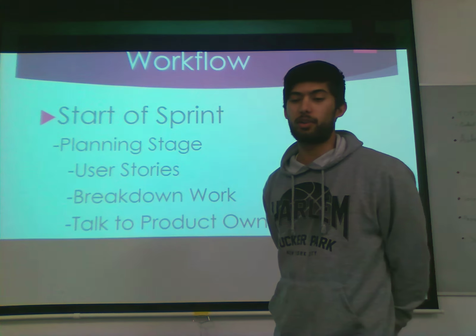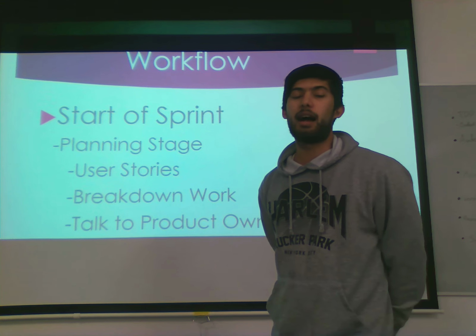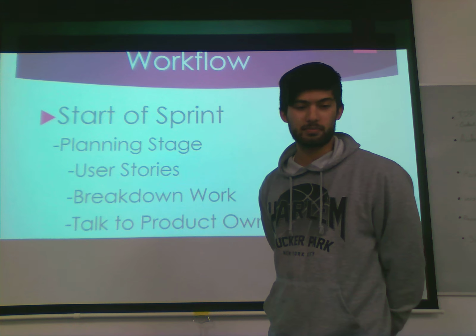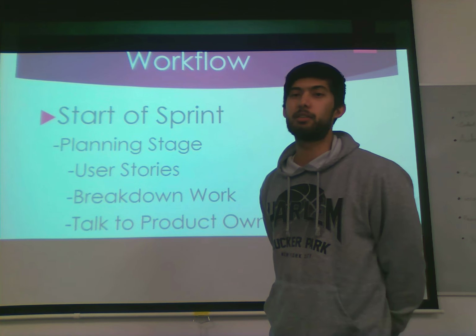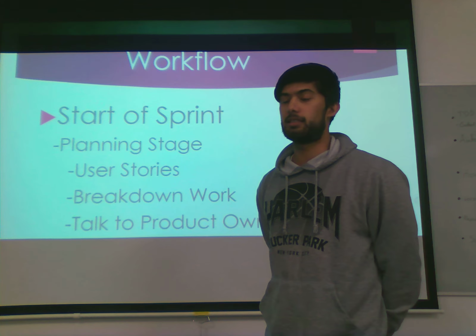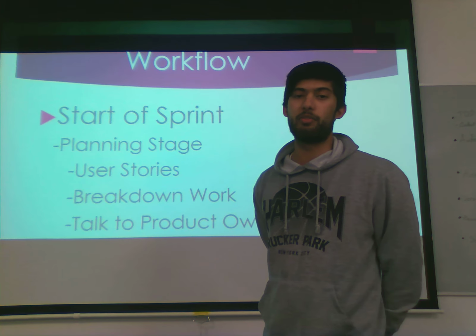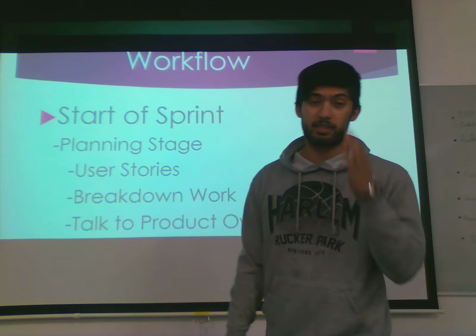We then worked out the velocity and estimated how many user stories or how many user points we could do throughout the sprint. We then broke down each of the user stories to fit into each week of the sprint and see how much we can do before the next sprint. So now I'll leave it to Hemish.